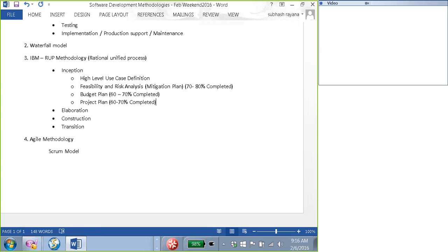See, what happens sometimes is one of the limitations we discussed with the waterfall methodology. Let us say when you are defining the scope, business probably has defined 50% of the scope, and they are still working on 40%, which may take time. It may take a week, 2 weeks, 3 weeks, 4 weeks. So technically, waterfall says that you're just not moving forward. Whatever high level you have, you just have to wait. You have to complete it 100% before you move on.